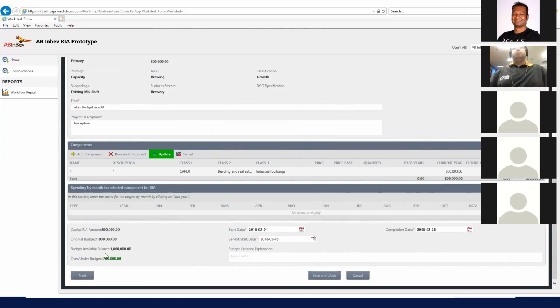I think, Fabio, it goes back to the concept I talked about with the budget. The rate never changes, right? After it's locked down in January, it's never going to change throughout the year. The actuals are going to change, but we measure everything off of a standard rate, because that's the only way we can drive true performance. We don't necessarily hold the impact of exchange rate fluctuations against the project team, either positive or negative. So we will always be using the same rate once it's locked down at the beginning of the year, in the January timeframe.